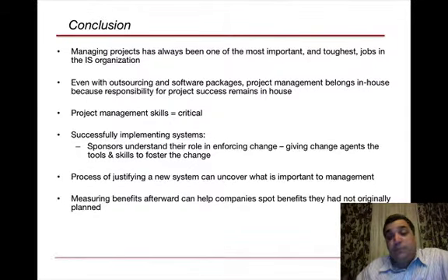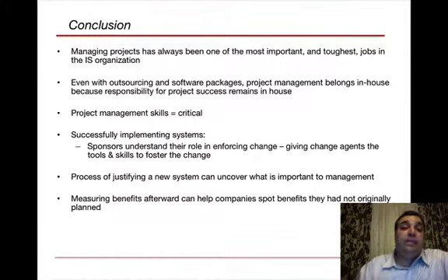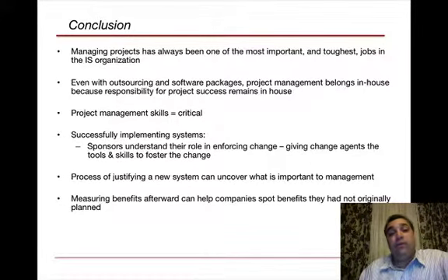Measuring the benefits afterward helps companies spot benefits they had not originally planned. If you go back once it's implemented and quantify all your benefits, you may find additional benefits, even intangible benefits, that will prove why this project was good. That can be added back in, and you can use it as a success criterion for the project.